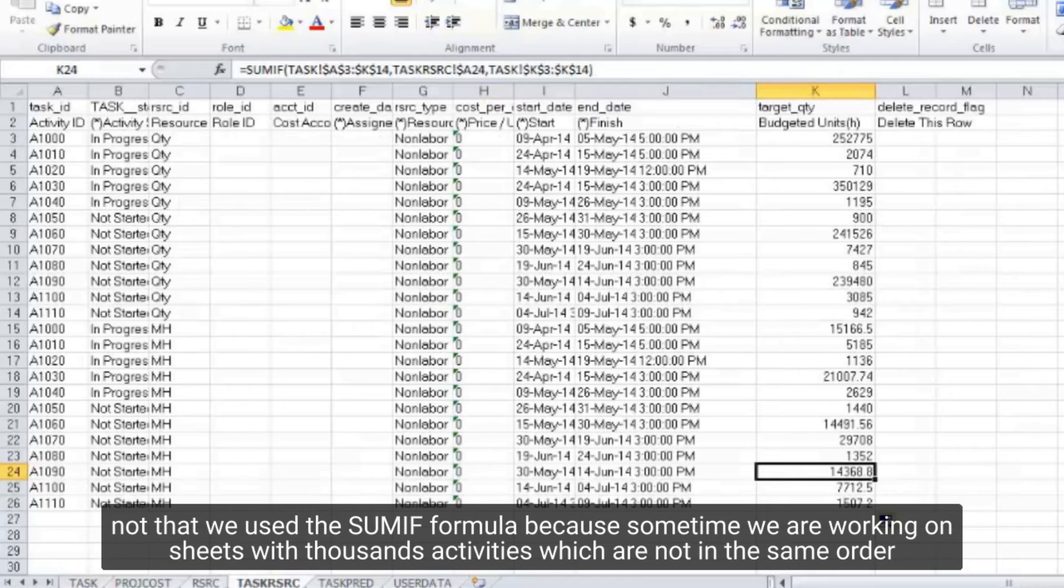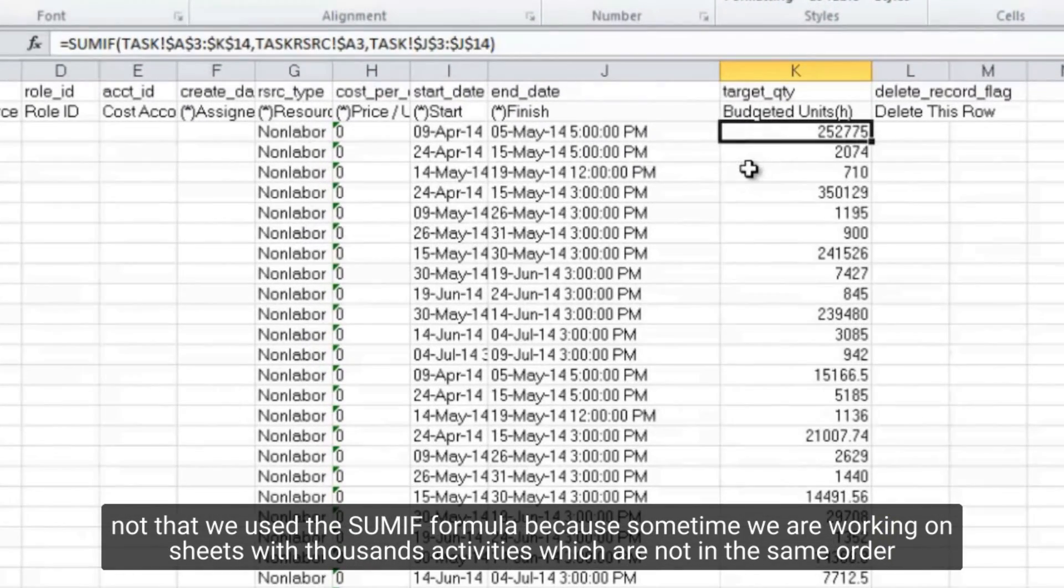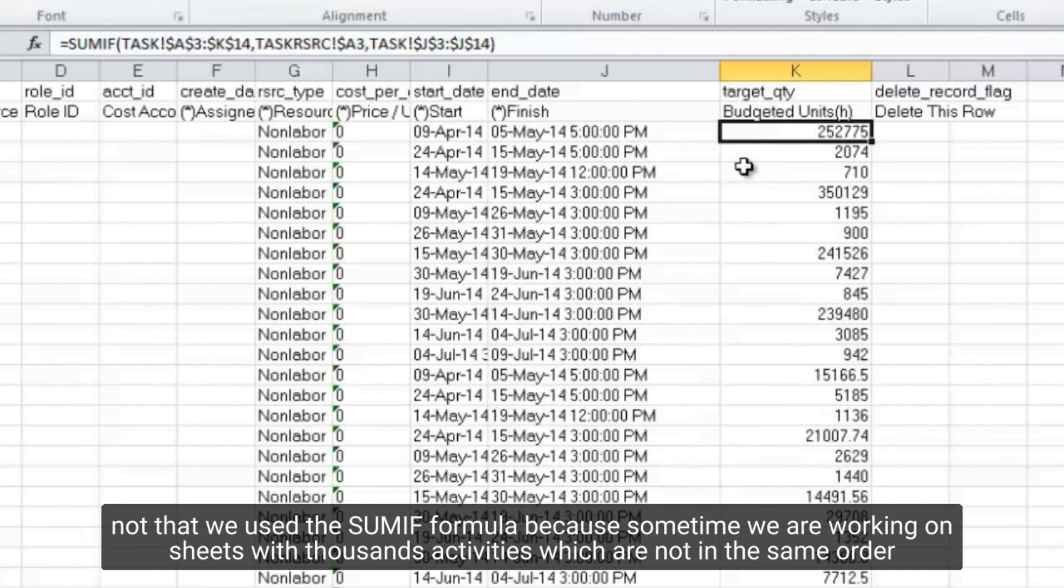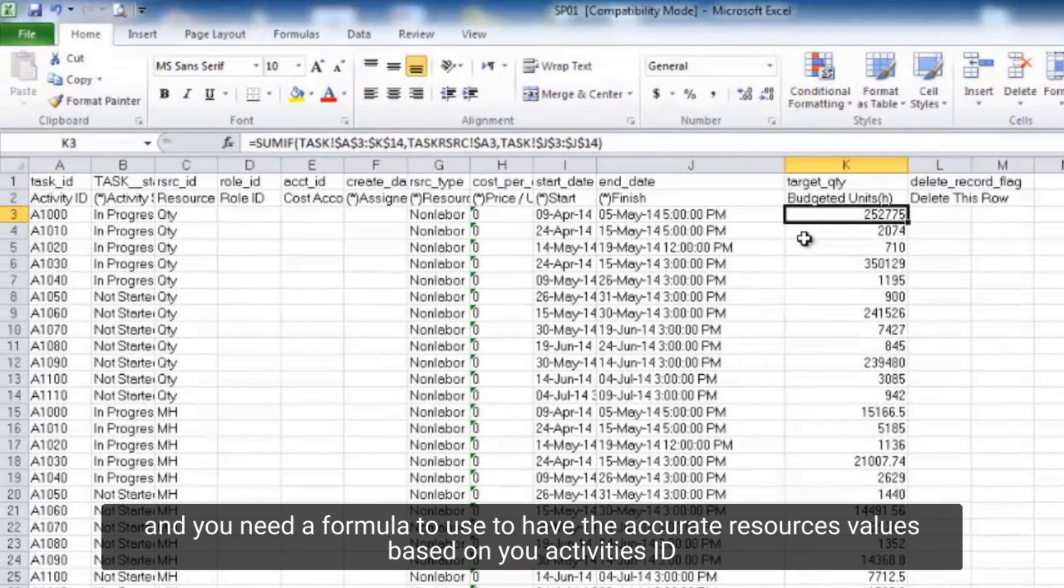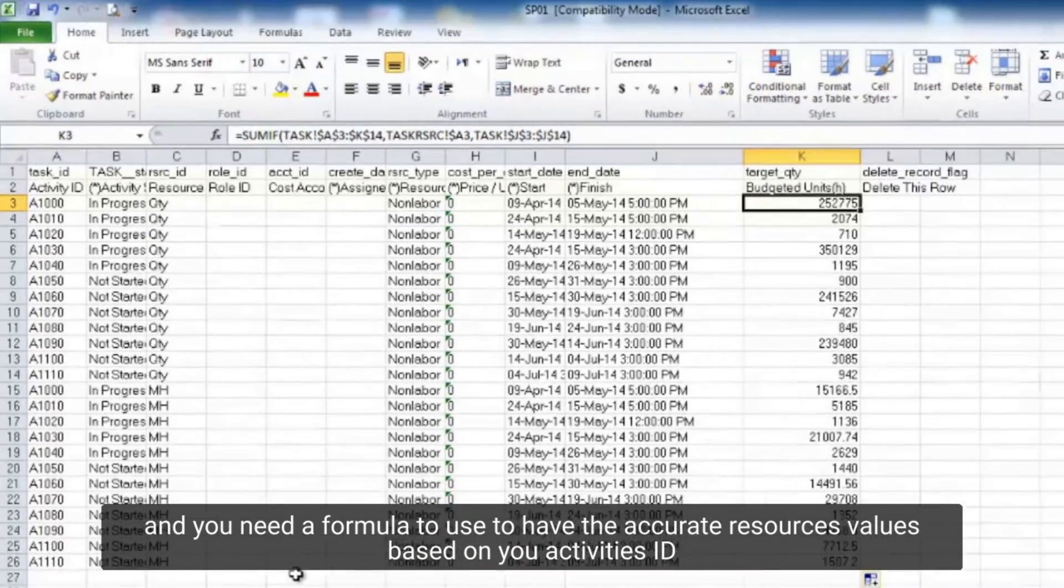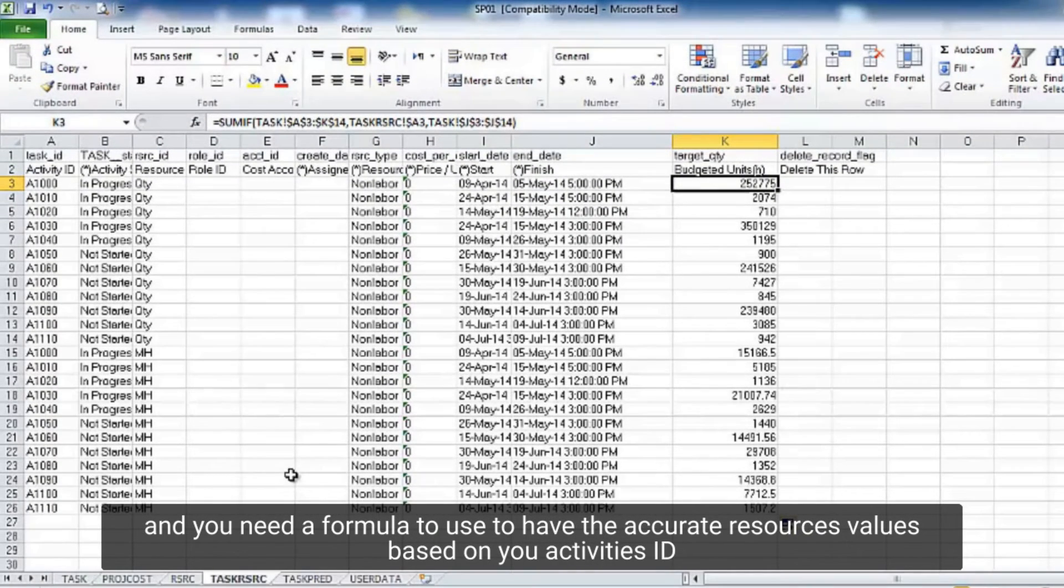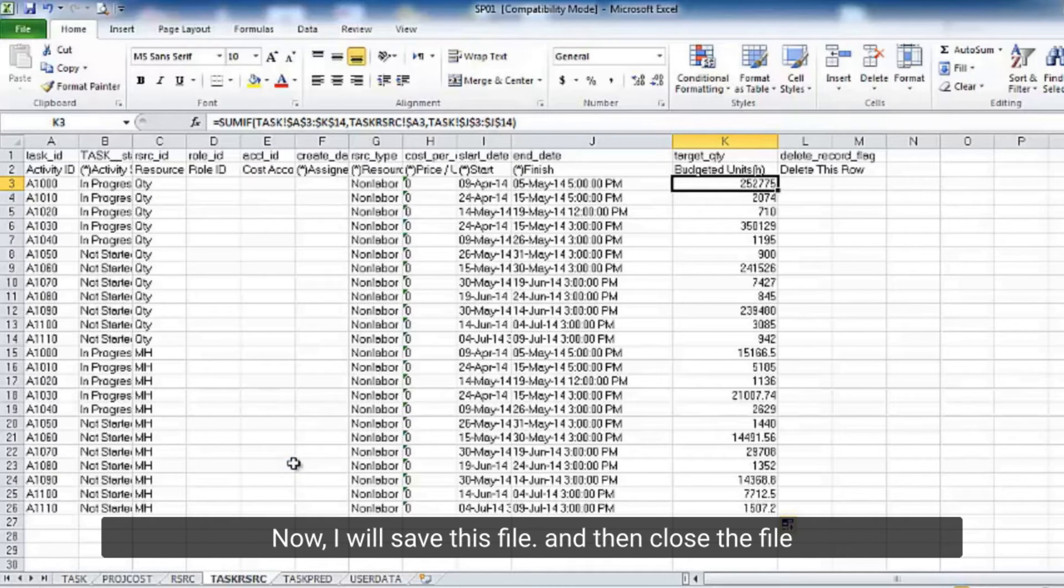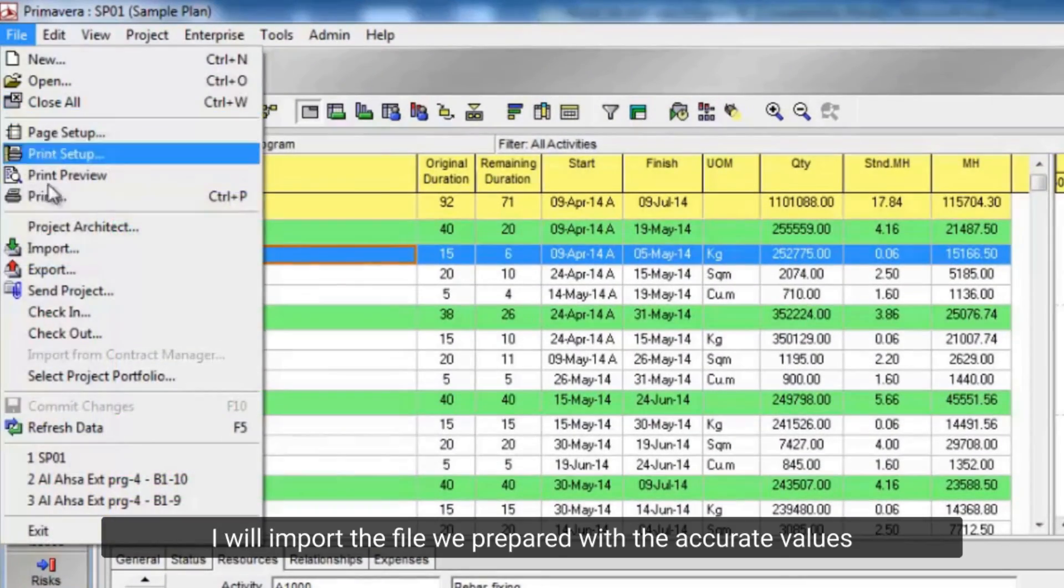Note that we used the sumif formula, because sometimes we are working on sheets with thousands of activities which are not in the same order. And you need a formula to use to have the accurate resources values based on your activities ID. So, we must use this formula to have an accurate result. Now, I will save this file and then close the file.